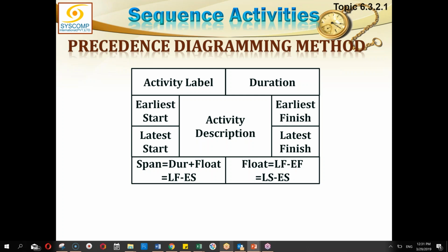If we know the durations, we will put them in and then find the dates: earliest start, earliest finish, latest start, latest finish, and so on, and we'll calculate everything. A box, which we said is a node in which the activity is shown, could be represented by this number of headings. This much information can be put into that box. This is one way of doing it. Many people show it in a slightly different way, but generally the same data is represented in a box.